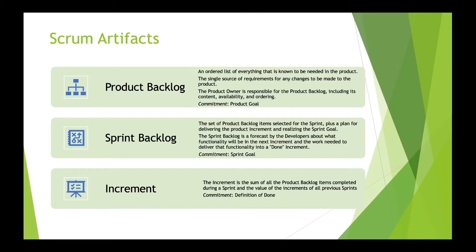From an artifact perspective, the product backlog can be thought of as the single source of requirements defining value to the stakeholders. It is owned and managed by the product owner, ordered by priority, and represents everything that is known to be needed in the product. The sprint backlog is a subset of the product backlog. It represents the plan for the current sprint, owned by the developers, and is a forecast of what will be delivered at the end of the sprint, defining the work needed to deliver the functionality.